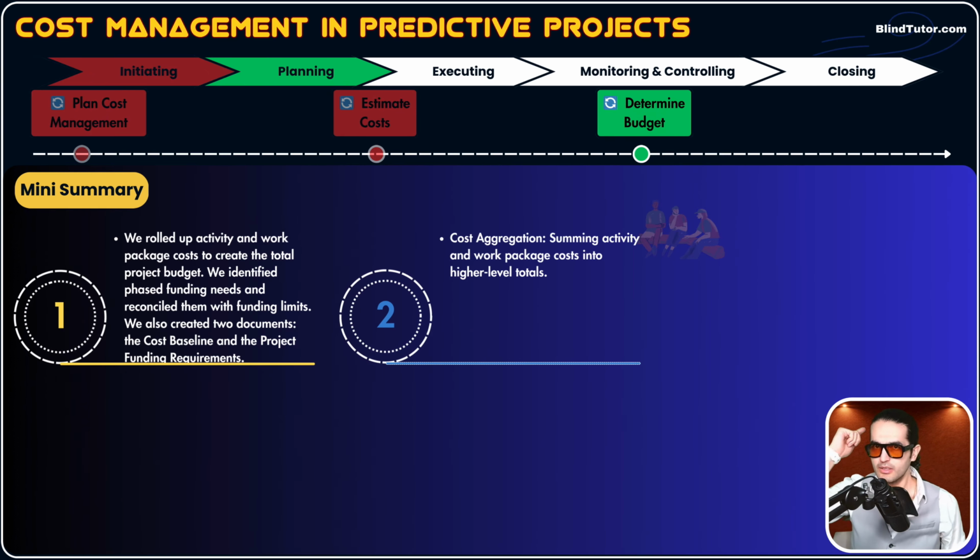Now, go back to the WBS, guys. Deliverables are categorized into control accounts. Control accounts are categorized into work packages. Work packages are categorized into what? Activities. Now, to get to the cost of that deliverable, we add up all activities that are mentioned under this deliverable. This is exactly what cost aggregation means: adding up, rolling up, summing up the activities cost to get to the upper level cost, for example, work package cost or control account cost or deliverable cost or the project itself.